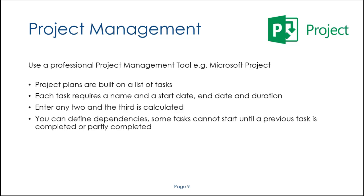You can define dependencies — which tasks have to be completed before a follow-on task can start. For example, if you're building a house: you build the foundations, then the walls, then the roof. You can't start the walls until you finish the foundations, and you can't start the roof until you finish the walls. Any slippage in an earlier task has a knock-on effect later — if the foundations took two months instead of one, the whole project slips by that extra month. Microsoft Project automatically calculates the effect on everything that depends on that slipped task.